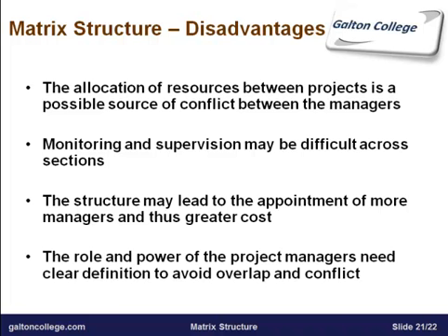The role and power of the project managers needs clear definition as well. There is a problem that they may start to encroach on each other's areas, and that encroachment could lead to problems, conflicts, arguments, issues, and also a waste of time and effort, and the involvement of senior management unnecessarily trying to resolve the areas. So it's a question of demarcation, working out precisely who's responsible for what within Project 1, Project 2. And also the centralized departments, the resources flowing to each one should reflect the importance of each project within the overall business.